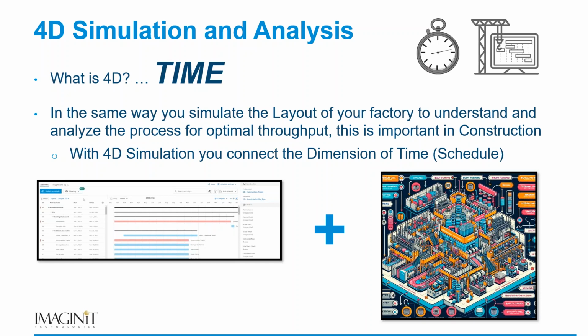And with the advent of schedules and these Gantt charts and tying them together with our BIM, with our design, the virtual design, the 3D environment, we are able to assign a task, tie it to a BIM element, or a piece of equipment, what have you, and we're able to go and define when it occurs and how it occurs, and the logistics.